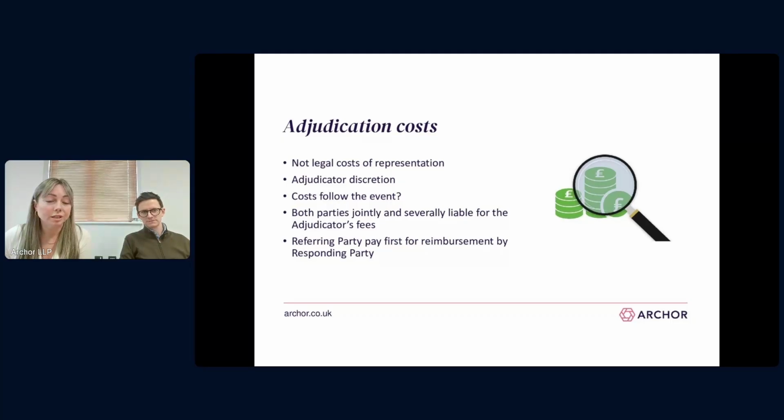Quite often you will see an order on costs that says the referring party has to pay all the adjudicator's fees in the first instance and then claim any payment from the responding party back, either in full because the referring party's won everything, or in part, or even if the referring party has lost, sometimes you have it vice versa. But just to be mindful, the adjudicator basically can do what they want on costs.